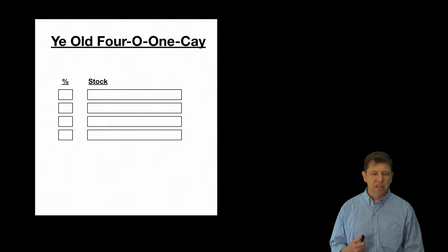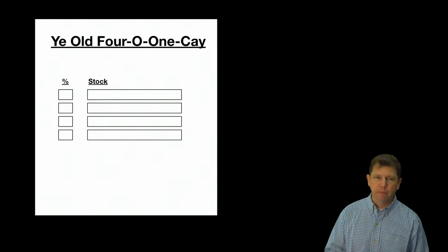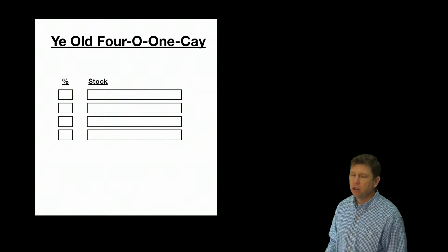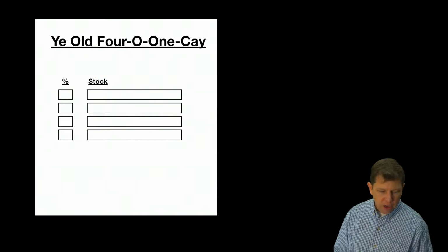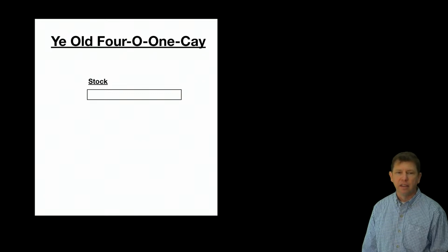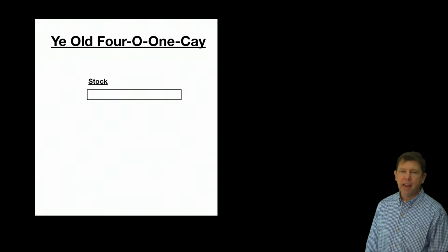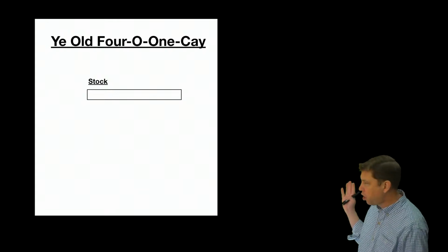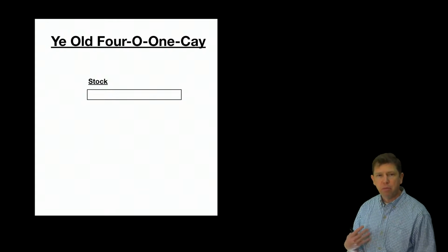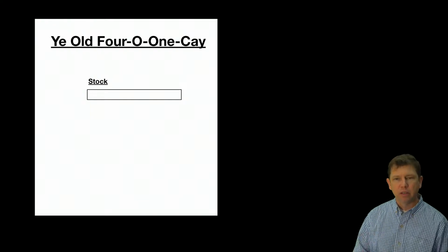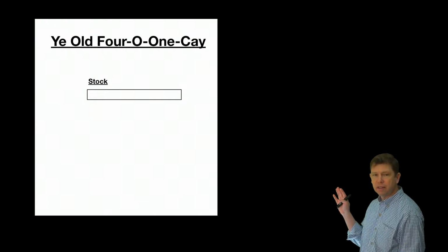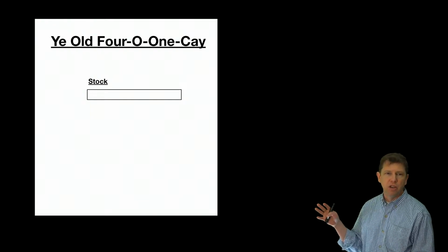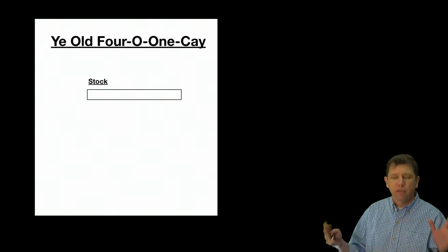So if we're looking for what's the simplest way we can deliver the next step forward, the simplest thing we can do that the user can actually start giving us feedback on, it might look something like this. We're just going to allocate the entire thing. So yes, we know we want to have percentage allocation, but if we start off with this, the customer is able to actually give us feedback. The user can say, hey, this works really well. Or they may say, you know what, that's not how we think about stocks. We need to choose it from a list instead of typing it, or whatever that looks like.